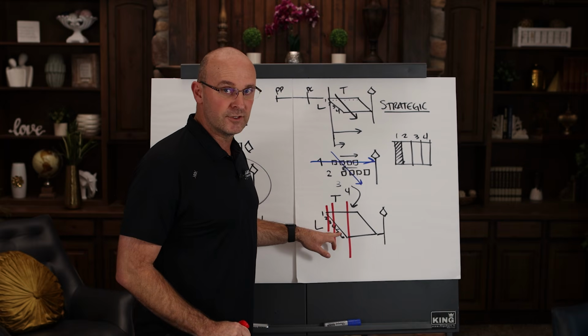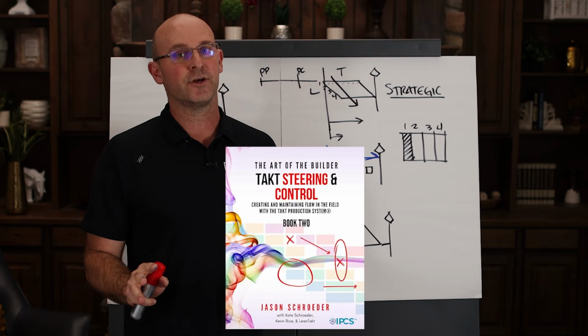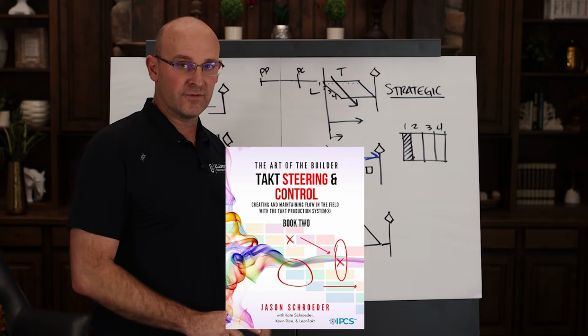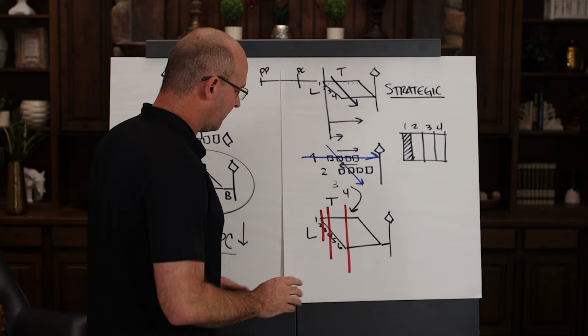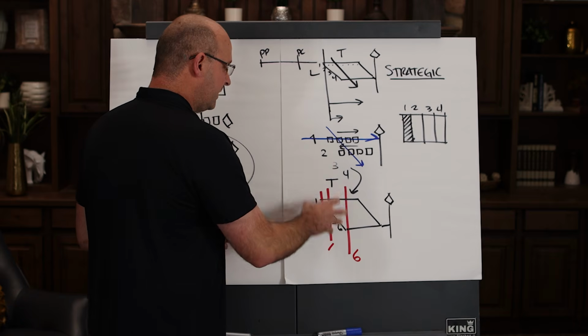Do we shove this down the trade's throat even though they promised here? No, we can adjust. That's where tact, steering, and control comes in, but you don't have to recreate the wheel all the time. I prefer to have this 4 to 6 weeks out. I like 6 and 1 week out, and this becomes the base.